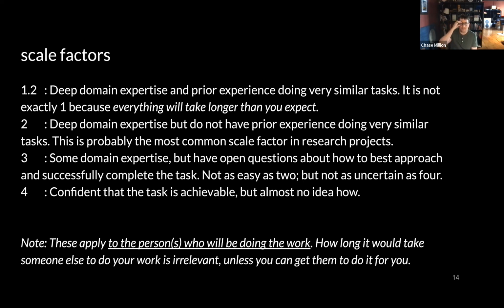So let's talk about those scale factors for a second. 1.2, you might think of that as like a 20% increase of your initial estimate. The reason for this is because everyone underestimates everything, even experienced estimators, even experienced software engineers. Everyone is more optimistic consistently about the time it will take them to do something, even something they have done precisely the same way before. So for that reason, we tack a 20% margin onto even the best case scenario.